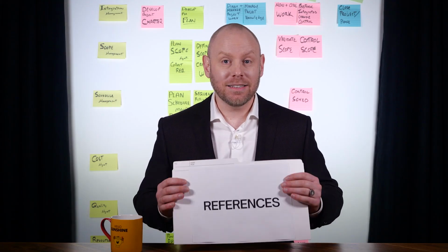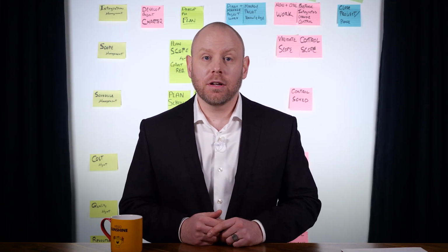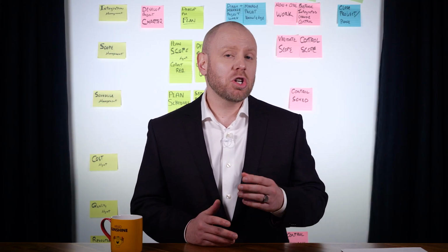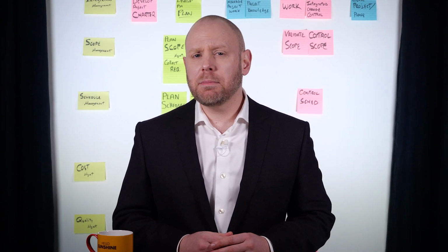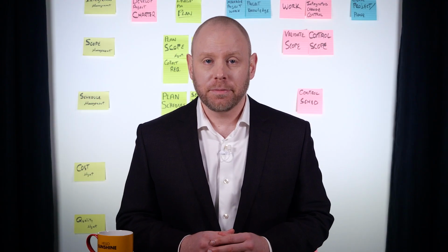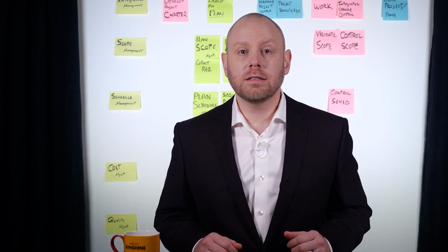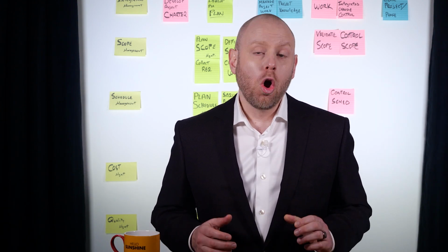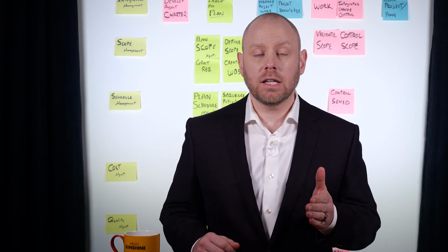With our references in hand, we can tap into our usual suspects. Expert judgment. For example, those with knowledge of political power structures, communication strategies, cultural expertise, or specific stakeholder knowledge. Data gathering. For example, the detailed data on our stakeholder analysis in our stakeholder register. Data analysis. This could also include a root cause analysis on stakeholders to better understand their support for the project. Or assumption and constraint analysis to understand the impacts of various engagement strategies.